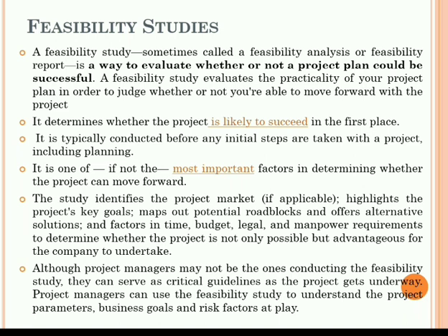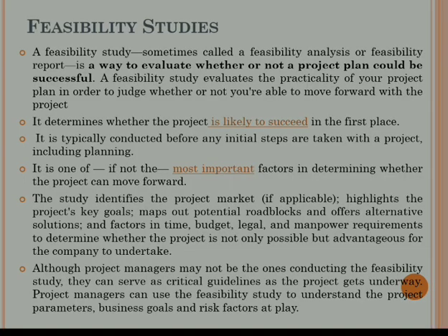It is typically conducted before any initial steps are taken with the project, including planning. It is one of, if not the most important factor in determining whether the project can move forward or not. The study identifies the project market, if applicable, highlights the project's key goals, maps out the potential roadblocks, offers alternative solutions, and factors in time, budget, legal, and manpower requirements to determine whether the project is not only possible but advantageous for the company to undertake.